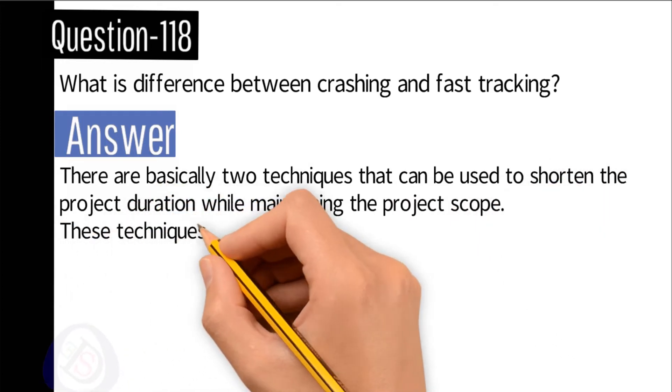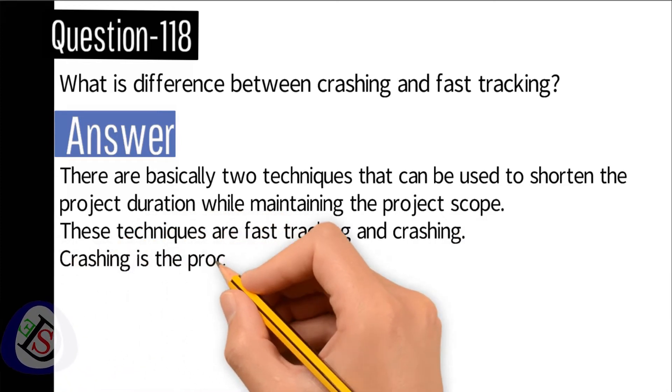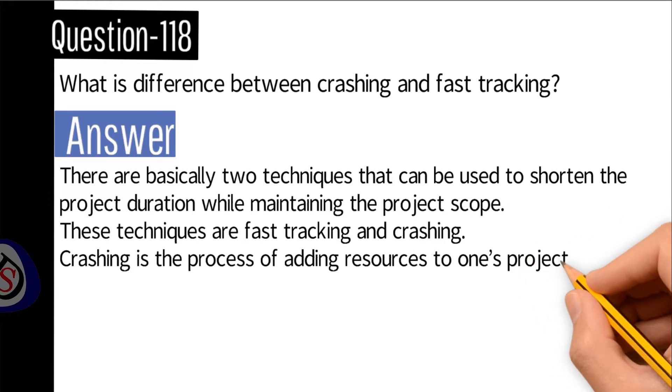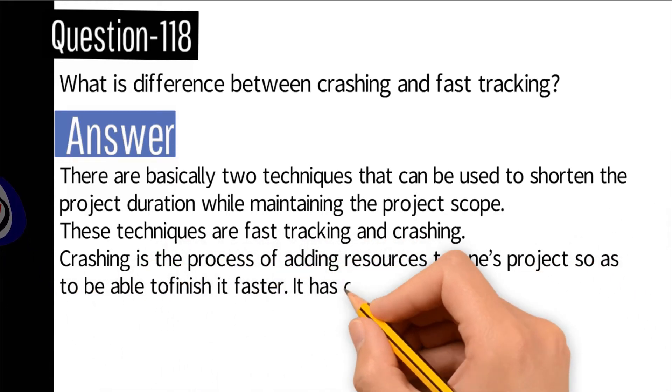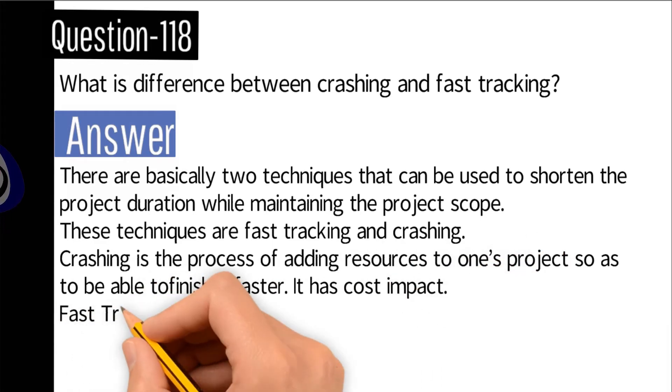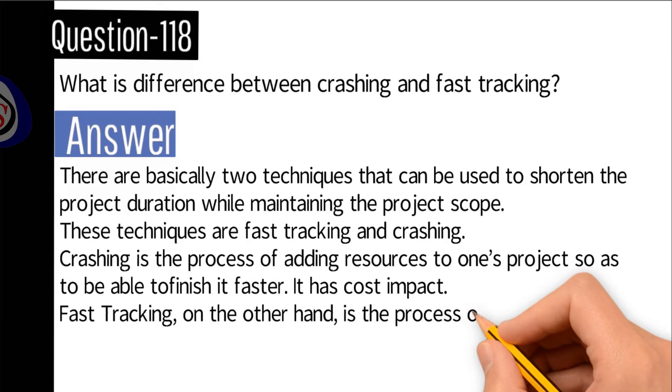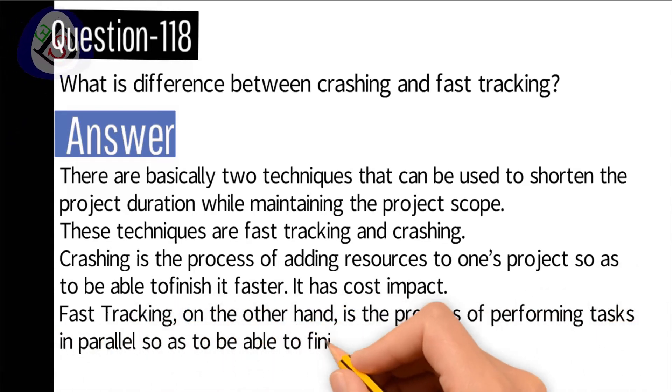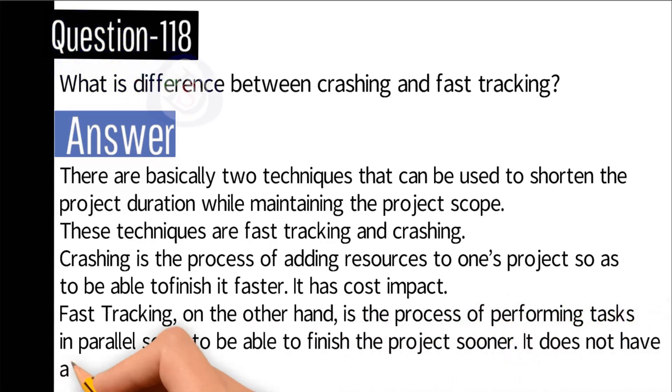Crashing is a process of adding resources to one's project so as to be able to finish it faster. It has cost impact. Fast tracking, on the other hand, is the process of performing tasks in parallel so as to be able to finish the project sooner. It does not have any cost impact but increases the risks.